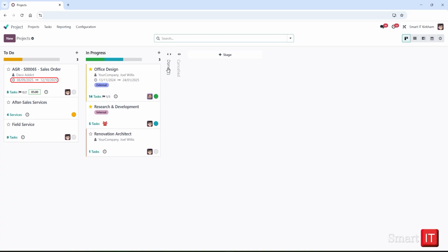project, the planned dates, if set, tags, milestones, number of tasks or tickets associated with the project, remaining hours, whether there are any outstanding activities on the project, status, and the project manager. Different color round icons in the bottom right of each tile show current status: on track, on hold, at risk, off track, and done. This status is set manually.